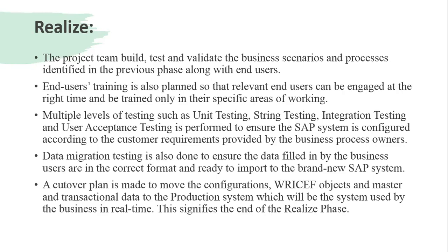End user training is also planned so that relevant end users are engaged at the right time and are trained only in their specific areas of work. Multiple levels of testing happen. We have unit testing, string testing, integration testing, and user acceptance testing performed to ensure that the SAP system is configured according to the customer requirements provided by the business process owners. Data migration testing is also done to ensure that data is filled in by the business users. Of course, the data provided must be correct and in the correct format.